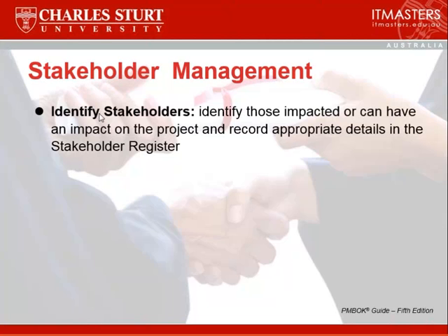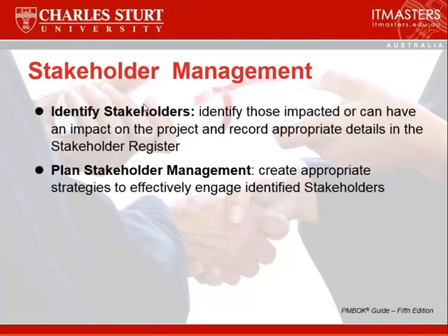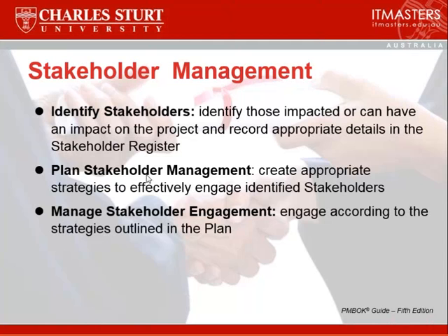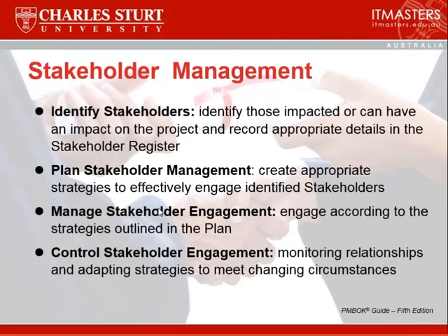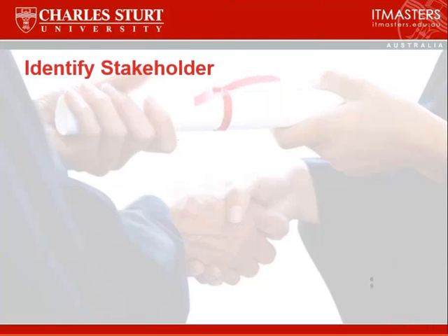Stakeholder management includes identifying the stakeholders at the very start. It's the second process in the PMBOK. We need to understand and identify all those people who are impacted or can have an impact on the project. They may perceive that they have an impact, so we really need to understand that anybody who thinks they're going to be affected by the project has to be recorded in a stakeholder register. We need to plan how we're going to manage our stakeholders. Then we go ahead and we engage with the stakeholders and we control those engagements.